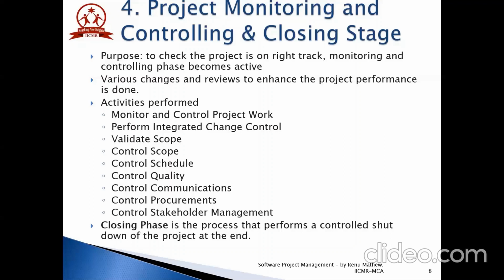Many projects stumble due to inadequate management of stakeholders. If the stakeholders are managed properly, there are more chances for project success. In this process, we monitor the current engagement level of stakeholders and take actions accordingly. The inputs for all these activities include stakeholder management plan, issue log, work performance data, and project documents. The outputs are work performance information, change request, project management plan updates, project document updates, and organizational process assets updates.